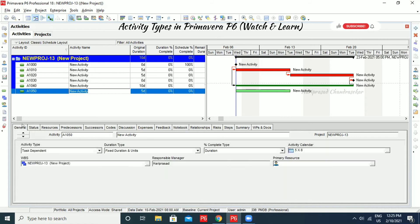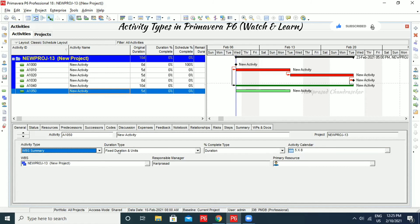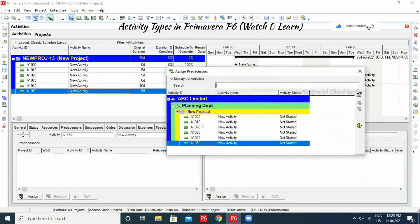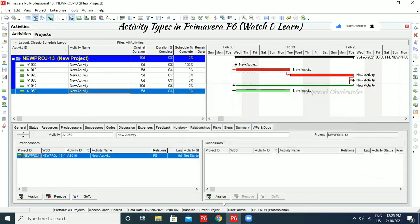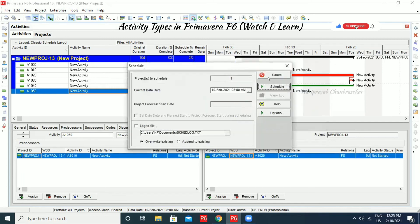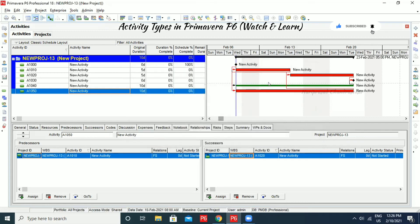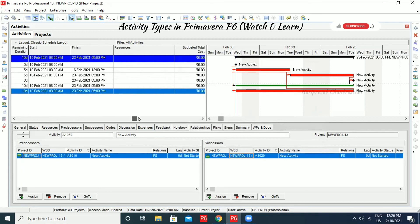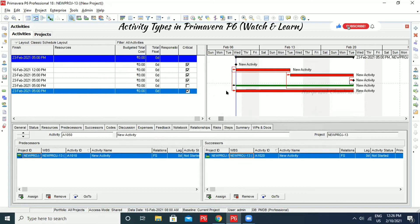Now I'm going for another activity and putting it as WBS Summary. This is typically used to summarize the WBS levels. Here also we can't assign any constraints. I'm putting relationships and going for Schedule. Can you see that? Even WBS Summary is similar to Level of Effort, but it does have a critical path — it is under the critical path. That is the only difference. When you have multiple activities for one project, WBS Summary and Level of Effort are useful for filtering purposes or to easily monitor activities.